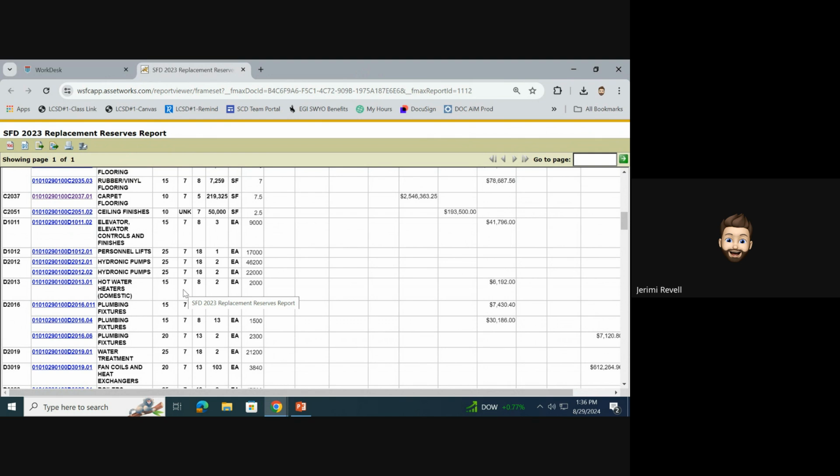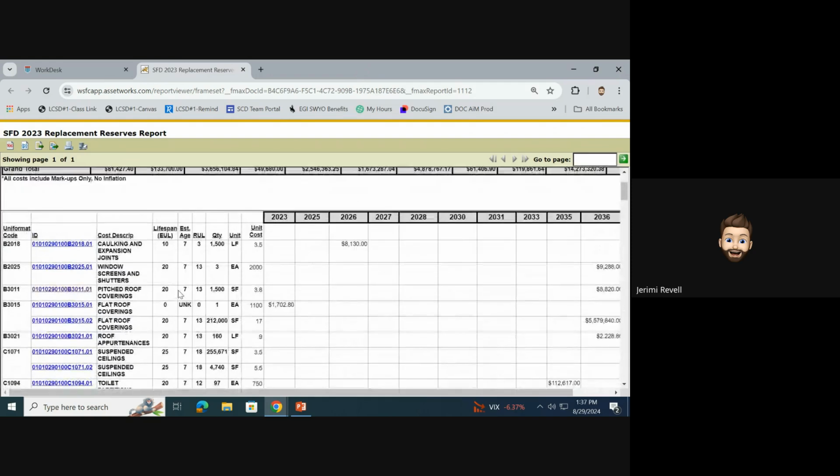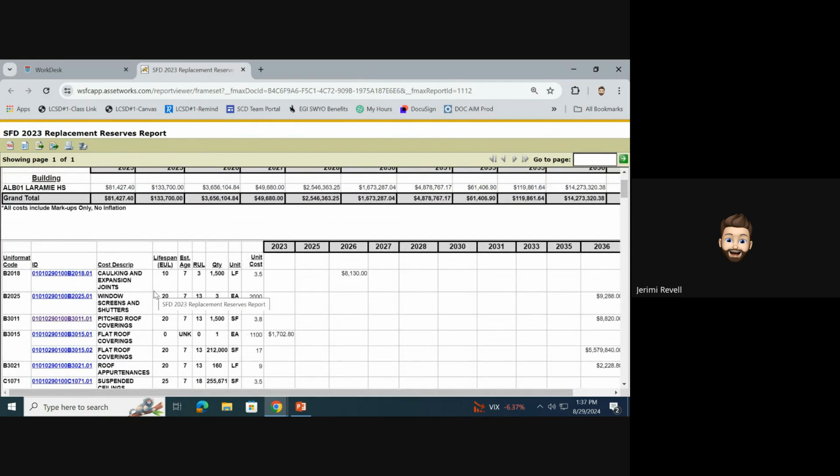locations on your building, and one remedy might just be a refinish of the existing rail, whereas the other location, you know, might be a northern exposure that doesn't see a lot of sun, that's had a lot of wear and tear, and it could potentially be a replacement in that location. So I think it's important to take a look at your unit cost, to look at your unit of measure, and from that you can kind of derive what the remedy was intended to be if it wasn't specifically called out. And again, that doesn't mean that that's what we're mandating.